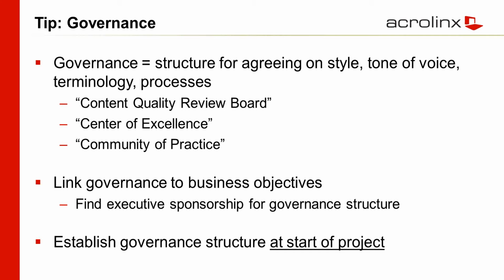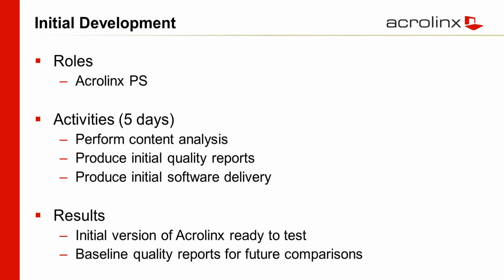Even within Acrolinx here, pricing or product naming happen to be areas where people have very strong opinions. And so what we've set up is, here's the group or person who will make the final decision, and then my role in that is to gather input. And I will represent all the input fairly. I will have my own recommendation, but it's this other group that I may be a part of, but this other group will be making the final decision. And when people understand that, it takes some heat off of the conversations.